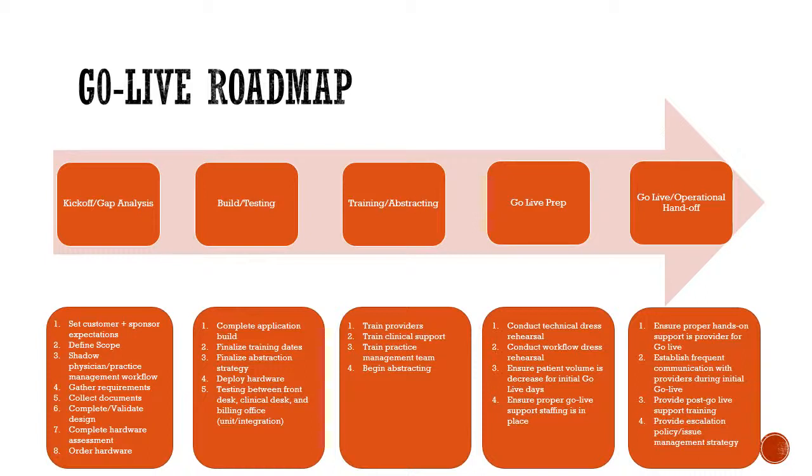Moving on to the next phase, we call it the build and testing phase, where your vendor or your software solutions team, technology partner, is customizing the solution to a certain degree to fit your practice needs. That could be through updating some of their registration visit types, or making preference lists for your provider so that it's easier for them to place orders. Whatever the case might be, these are based on the design from the kickoff and gap analysis phase.